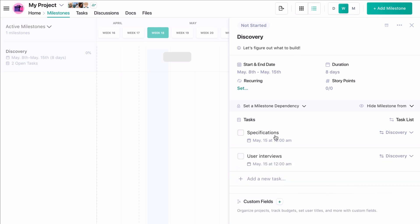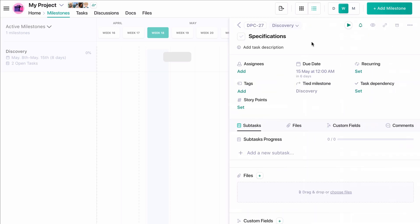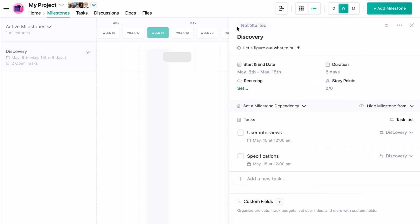You'll notice our tasks picked up the end date of our milestone. We can change these deadlines on the task level so long as the new due date is within the milestone's date range.